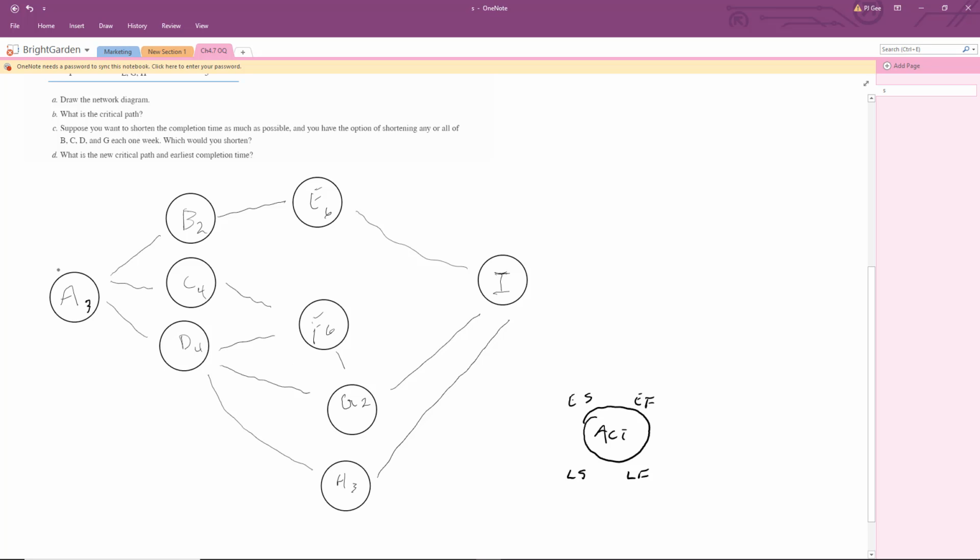So we work forward to begin with early start times. We're trying to figure out what the critical path is here, but we're also trying to find slack time. Which of these activities has some slack time? So with A, we're working forward. We go through the early version of this, where all the processes start as early as possible. So we start at 0, and we add 3. We move the 3 of the early finish to the early start of the following processes, okay?